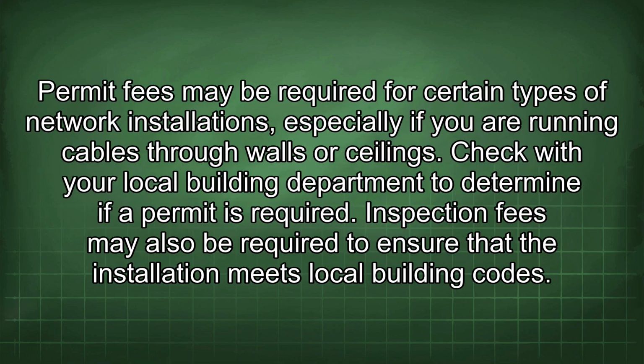Permit fees may be required for certain types of network installations, especially if you are running cables through walls or ceilings. Check with your local building department to determine if a permit is required. Inspection fees may also be required to ensure that the installation meets local building codes.